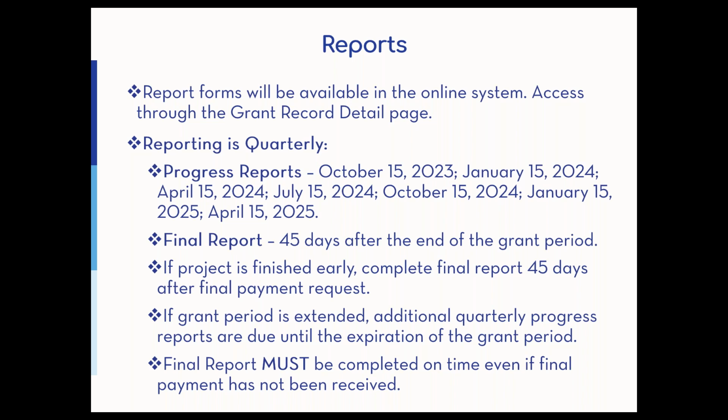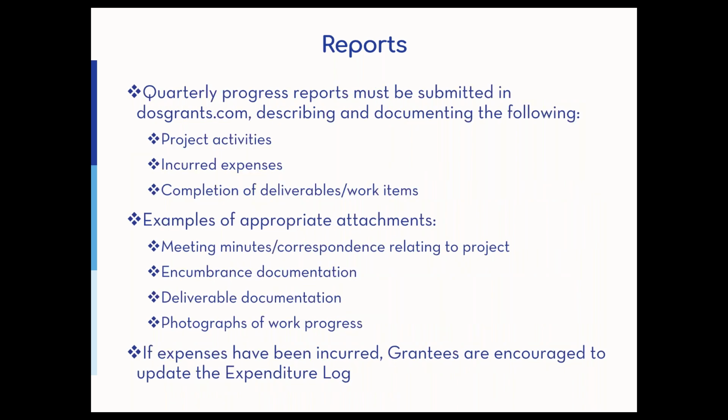And even if you haven't received your actual last payment, you are still required to file your final report as if the funds were received. The reports are pretty simple. You would include what work has been done. Any expenses that you've incurred will go into the expenditure log, and you can mention deliverables or work items that have been finished. The report does require at least one attachment.